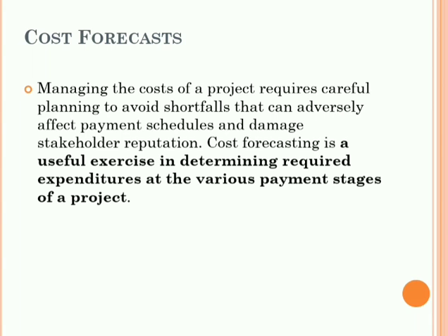Okay, compliance: the cost forecast rolls up to the organizational financial statements, that is income, cash and balance sheets, and therefore, especially for publicly listed companies, cost forecasts are audited by third parties as per GAAP and IFRS guidelines. The estimates are generally not subject to such audits. On stakeholder management, the cost forecasts are also a report on the project team's performance. The cost estimates, however, do not pinpoint any team's or individual's performance. Therefore, the stakeholders' engagement in cost forecast is different than in cost estimates.